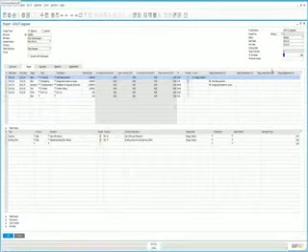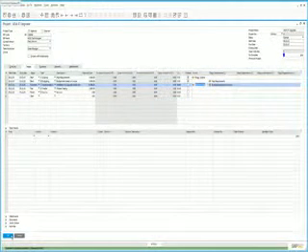Let's now move on to the actual execution of the project. So if we move on to our implementation phase, we can see that we have defined a planned cost of $21,000, and this is the result of the scoping and budgeting that was done in the previous 2 phases. The person responsible for the implementation phase is going to be a user called Julie Bowens. Julie has at least spent some time on the implementation phase, and as a result, we can now start posting